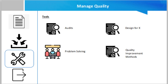Problem solving is another tool. Quality assurance and quality improvement require problem solving, where you find the cause of the defect, generate possible solutions, choose one of those solutions, and then implement it. Quality improvements can be based on recommendations from the quality control process or uncovered during the Manage Quality process. Methods such as Six Sigma can be used to implement quality improvements.